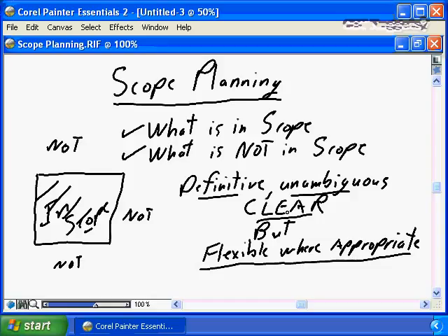it's flexible where appropriate. It doesn't truly impact the planning process, doesn't truly impact the work or the cost to the project to give the homeowner, yourself, the flexibility to determine the colors of each room much later in the project. Maybe you would put a statement in that the colors for the rooms must be determined 2 weeks prior to the painters coming on site, for example. That gives us flexibility where appropriate.